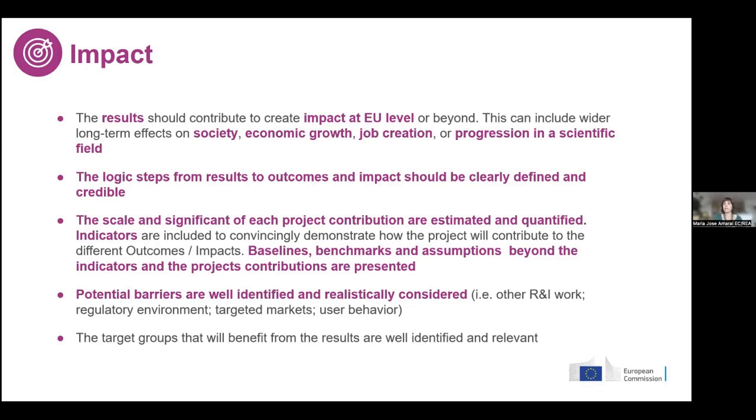You should estimate and try to quantify when possible, including indicators, but you need to show how this quantification is based on baselines, benchmarks, and assumptions, so that we can clearly understand you expect to deliver this result, you expect that this result is going to contribute in this way, but you have to explain in what way and on what basis your estimations are done.